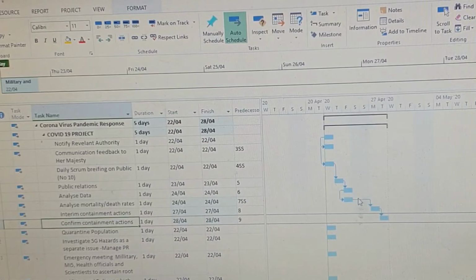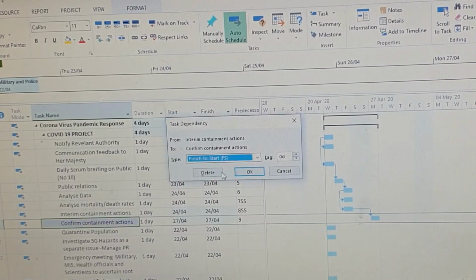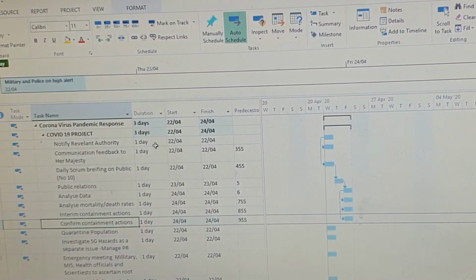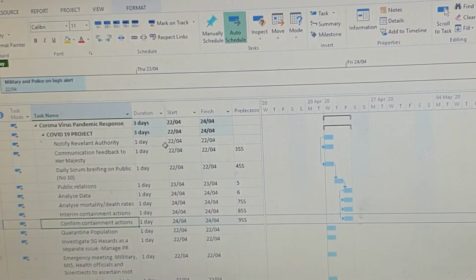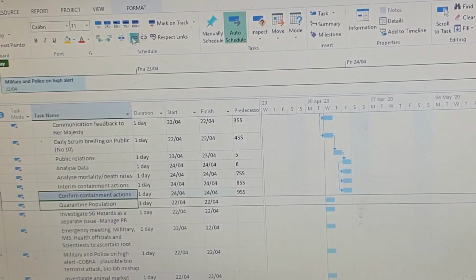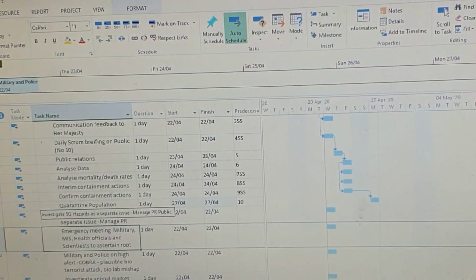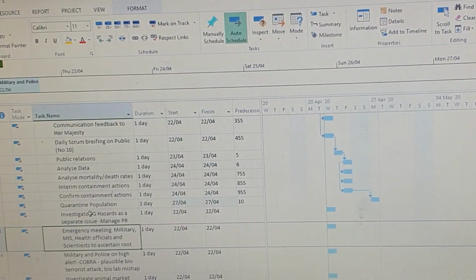So the project days of 1 day, 6 days, it's all hypothetical. It's not in real time, but if you're planning your project, you should be meeting with the stakeholders to confirm the required dates, or at least, from experience, you should be able to say how many days an X or Y number of tasks would take. Right, so some quick tips would be to look at your left-hand pane, where you can find the task mode. You can tell that the project is auto scheduled because you can't find any pin underneath the task mode. It's all in blue with an arrow sign. And so that tells me that it's auto scheduled.